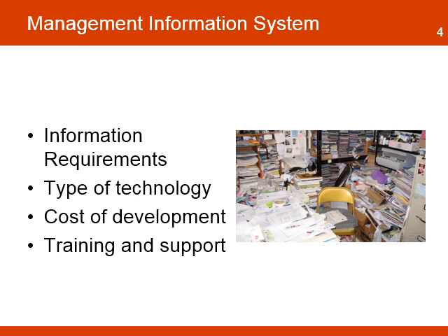Among the factors to consider are the requirements for information from key stakeholders, especially those that need information to make decisions, the type of technology, from simple desktop tools to complex online databases, the cost of developing and implementing a system, and the effort to train staff and provide them with technical support.